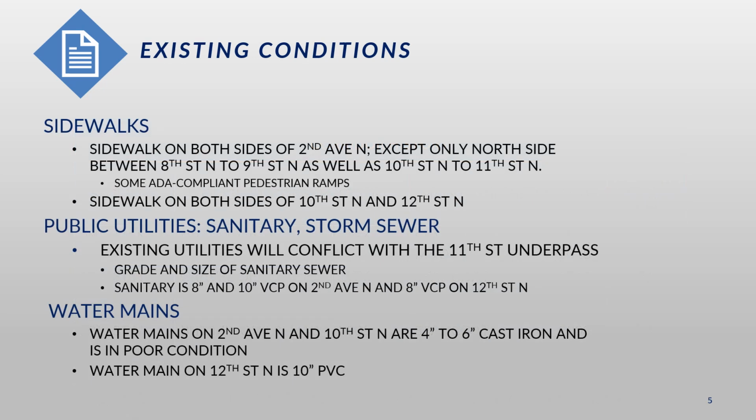The existing utilities on 2nd Avenue were prime candidates for replacement due to their age, material, and condition. And these utilities needed to be increased in size and depth to maintain continued service during and after the MnDOT project on 11th Street.